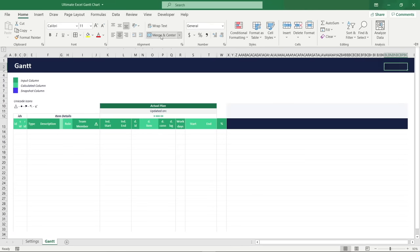We manually set up the schedule for the tasks and milestone of this stage. As soon as we enter the independent start date, plan start and plan end are instantly displayed since workdays defaults to 1. For the milestone, we only need to enter the independent start date and can leave the workday cell empty, as we want the milestone to start and end on one particular date.